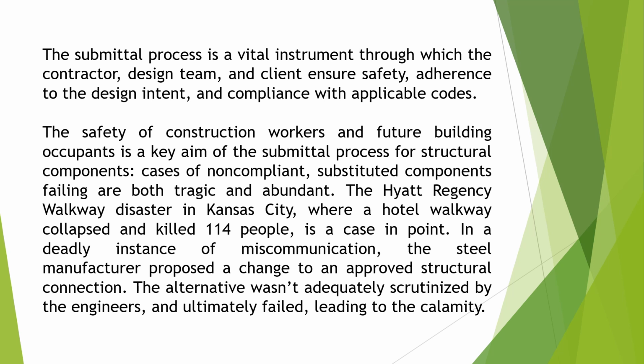Example, the Hyatt Regency walkways disaster in Kansas City, where a hotel walkway collapsed and killed 114 people, is a case in point. In a deadly instance of miscommunication, the steel manufacturer proposed a change to an approved structural connection. The alternative wasn't adequately scrutinized by the engineers and ultimately failed, leading to the calamity.